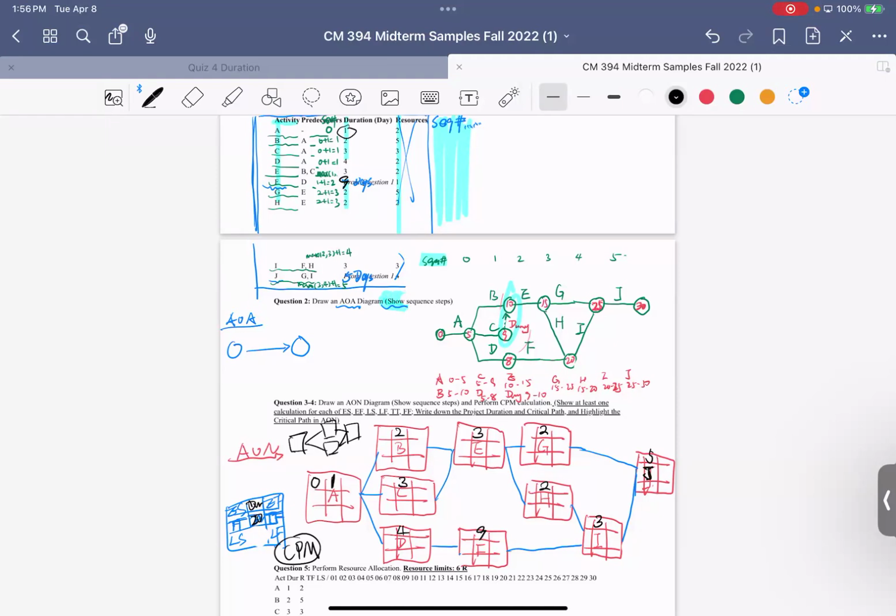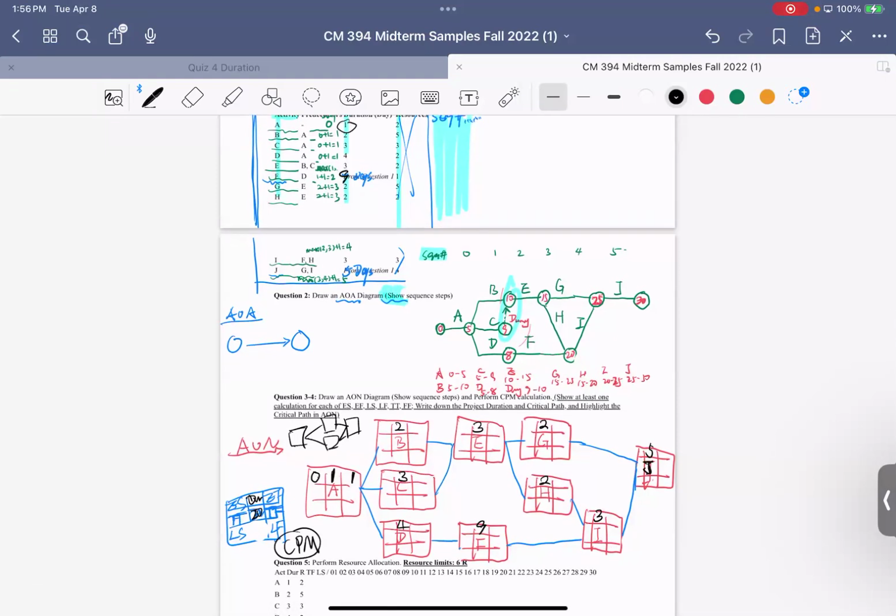Okay? So 0 plus 1, you get a 1. You put in 1 here, and you have 3, 4, 5. Pick up the maximum, 4 from here gives 7. And pick the 5 here, you get a 14. And the 7, you get a 9, and the 9. You get a 9 and the 14, and the bigger one is 14 here. 14, 17, and the 17 and the 9, you get a 17, and you get a 22. Is that correct?